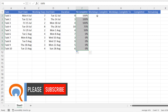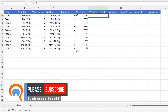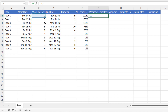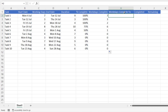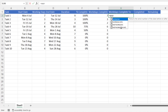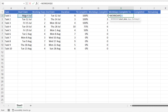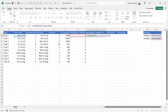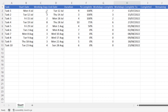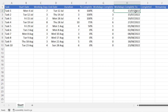For percent complete you can just type in your own values. Now for work days complete: I multiply the working days by the percent complete value, then copy that down. For work dates complete, I calculate the work date that is a given number of working days on from the task start date using the WORKDAY function — start date comma work days complete comma holidays, which I need to fix. I have the same offset issue, so I subtract one from the result and copy it down.